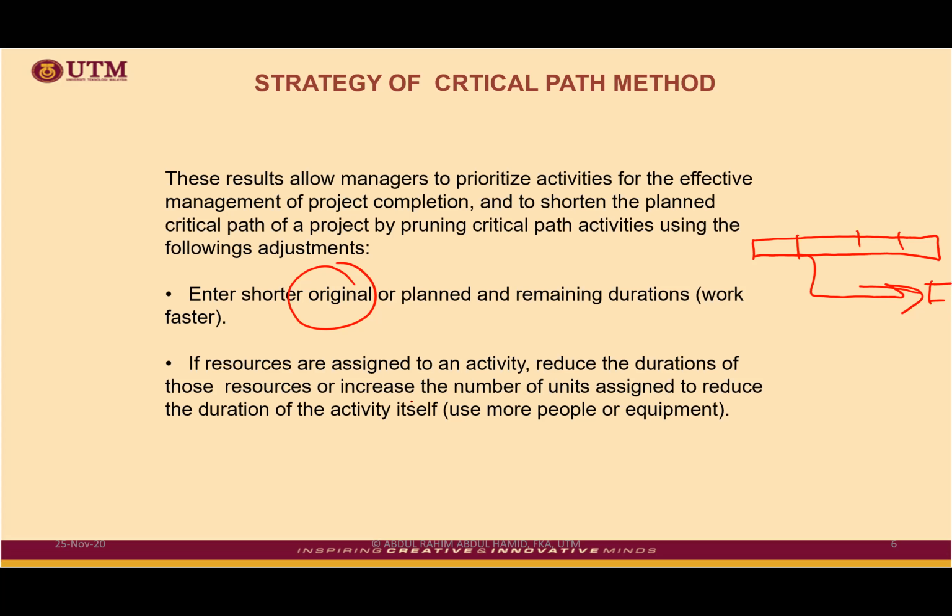If resources are assigned to an activity, reduce the duration of these resources or increase the number of units. For instance, the duration of a certain activity, short or long, very much depends on resources. Let's say for this activity of 4 days, you require a resource of 2. But if you increase the resource to 4, for sure you can shorten this activity. That is how we play around, especially when we are running late